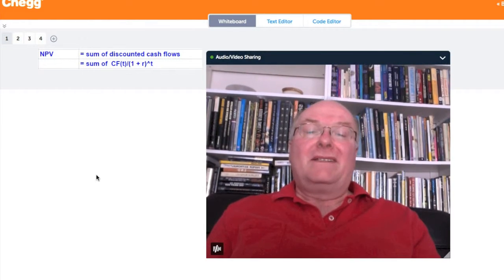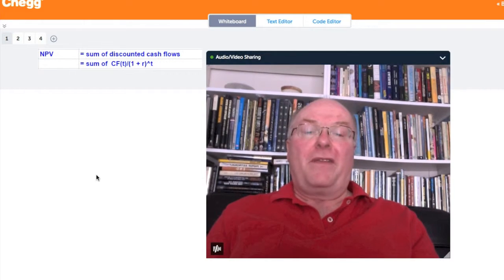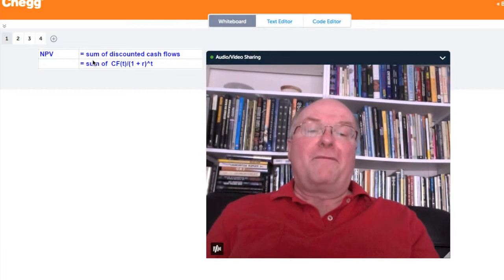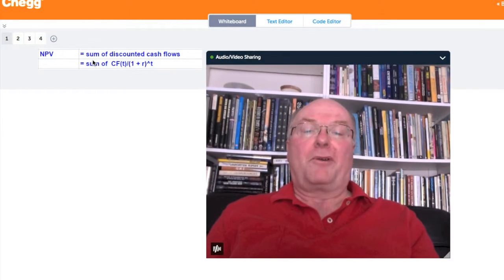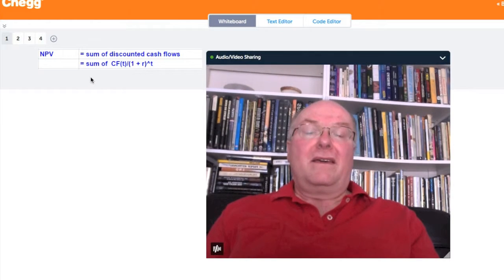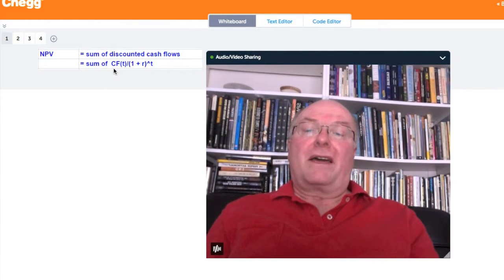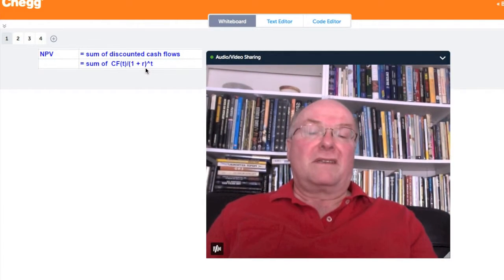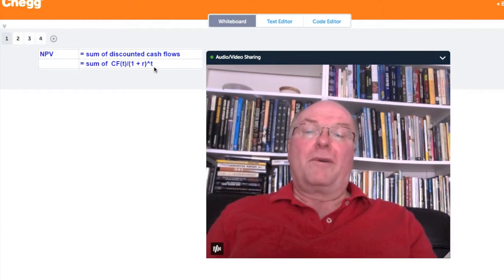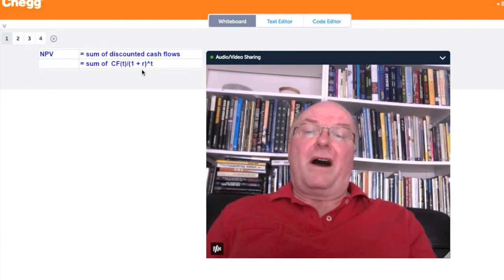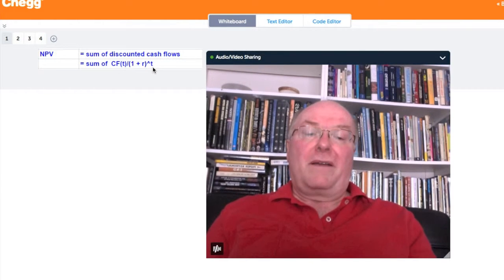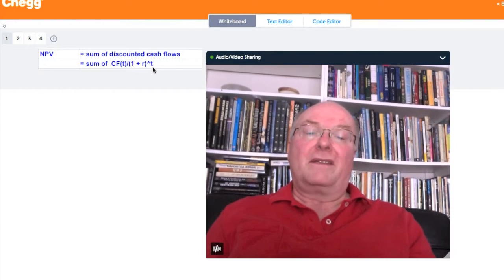If you've already done the section on discounted cash flows, you'll find this easy, because net present value is simply the sum of the discounted cash flows for a capital project. And as we've seen, the discounted cash flows are calculated as the cash flow at any given time t divided by 1 plus the discount rate as a decimal to the power of the period t. So if r, the discount rate, was say 10%, that value would be 0.1, and t will typically be in periods of years, so it'll be year 1, year 2, and so on.